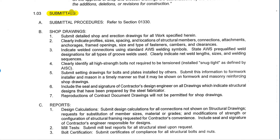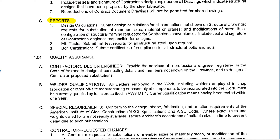Next we're going to get down to submittals. In general conditions — or 1330 in this particular project — it talks about the specifics and procedures for submitting. In the spec section itself, it's going to talk about exactly what needs to be submitted. For structural steel, we're looking at shop drawings — the detailed shop and erection drawings — along with different reports such as design calculations for connections, mill tests with information from the raw steel, and bolt certification to show compliance.